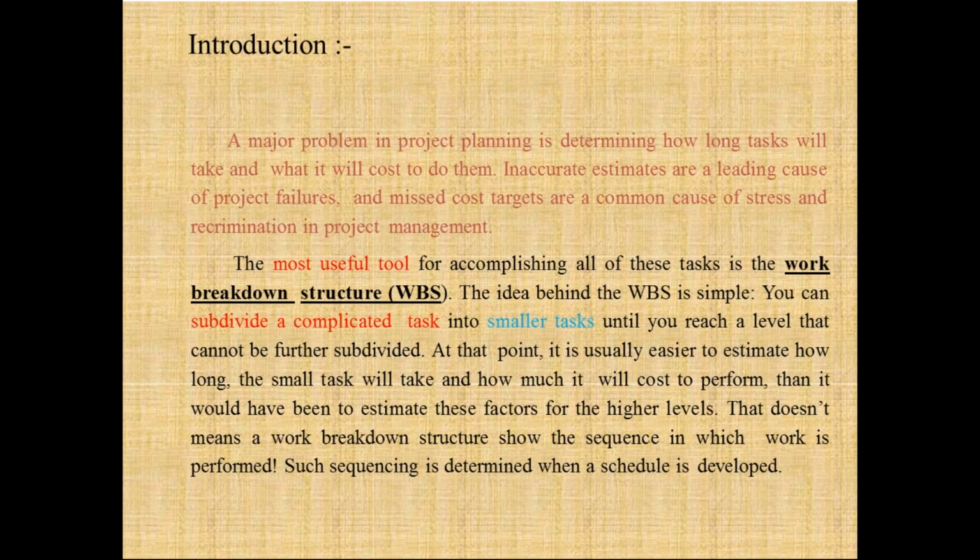The idea behind the work breakdown structure is simple. You can divide or subdivide a complicated task into smaller tasks until you reach a level that cannot be further subdivided. At that point, it is usually easier to estimate how long the small task will take and how much it will cost to perform than it would have been to estimate these factors for higher levels.